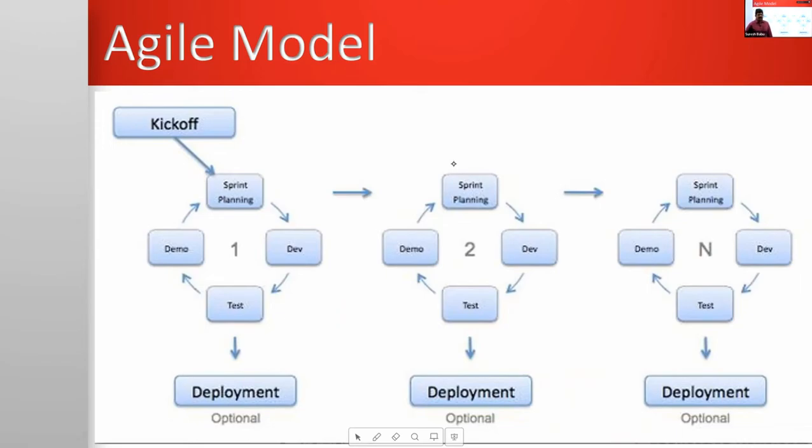Let's say a total of 40 requirements are to be implemented in a product. In the waterfall model, we plan a lengthy schedule, 3 months, and all 40 requirements are implemented in one schedule. Whereas in the Agile model, the total 40 will be split into multiple phases. Not 3 months of schedule, but 1 week of schedule, maximum 10 days. A Test match schedule is about 5 days, a T20 schedule about 4 hours. Rather than making a lengthy schedule, make short schedules, 1 week or 10 days, not more than that.